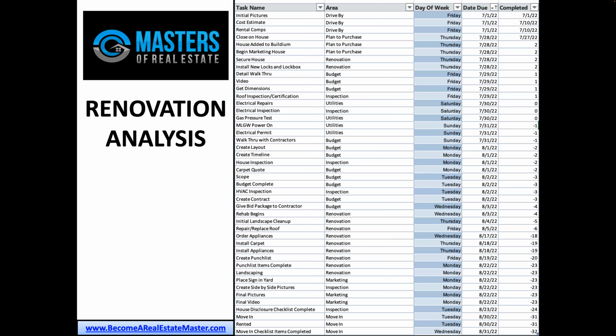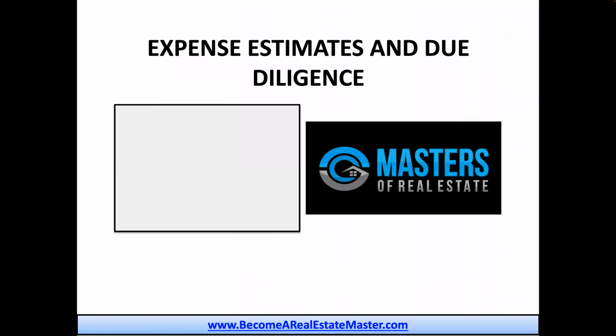I like to do it multiple times through the project to make sure that I'm on budget and can have my right exit strategy, because you may not want to sell a house if you're thin on margin and it makes more sense to cash flow. Or if you're over budget on a property and the cash on cash return is too low, you may want to go resell that property. So analyzing that after the fact is absolutely key.